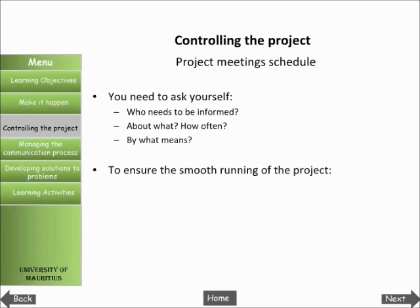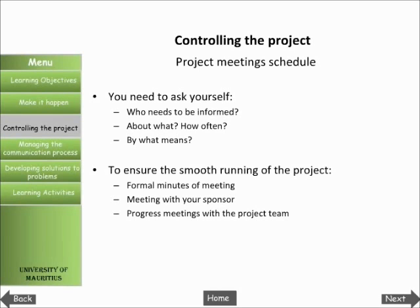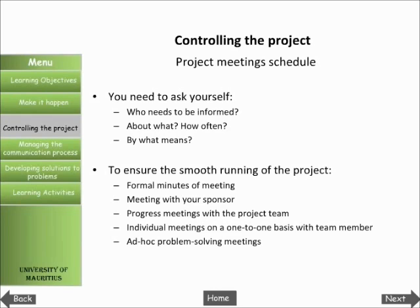To ensure the smooth running of your project, you might need any or all of the following: formal minutes meetings, which probably run to a schedule outside your control; meetings with your sponsor, which might be on a one-to-one basis; progress meetings with the project team; individual meetings on a one-to-one basis with team members; and ad hoc problem-solving meetings when particular issues need to be resolved.